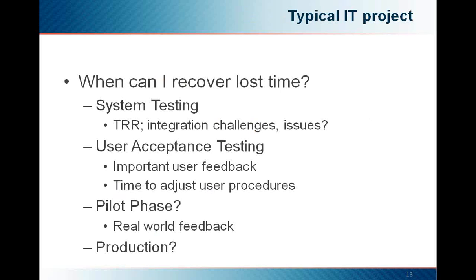So in our project now, our theoretical project, we finally made it to the point where we're at system testing. The delivery of the software, as we just said, is going to be late, and the project manager really has limited options to make up for lost time. If the time is to be made up in the testing phase, of course quality may suffer. Also, there remains a risk that a system integration issue could affect the application just like a design flaw did in the previous slide. It looks like we're a bit of a catch-22.